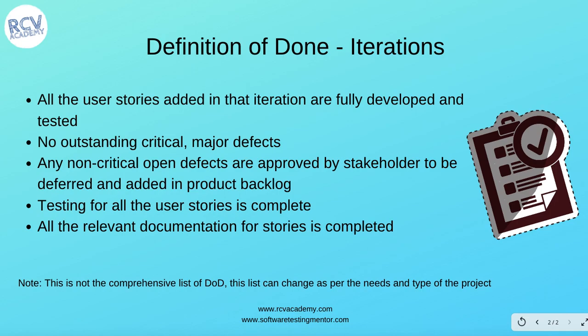The first thing to look at is that all the user stories added in the iteration are fully developed and tested and good enough to be shipped as a product. Any stories you pick in the iteration or sprint need to be fully developed and tested and represent a working product. You should not have any outstanding critical or major defects for any of the user stories picked.